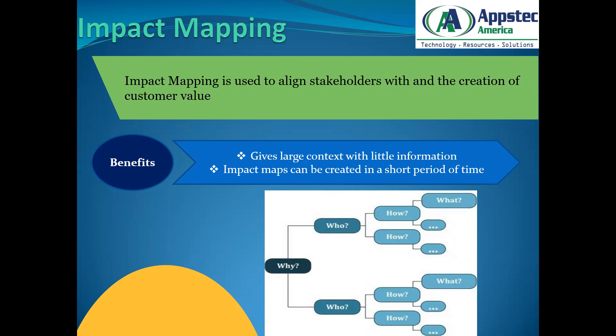Impact mapping is considered a lightweight collaborative planning technique for teams that want to understand the impact of the software or product they are trying to build. It is based on user interaction design, outcome-driven planning, and mind mapping. Impact maps help delivery teams and stakeholders visualize the roadmap, explain how deliverables connect to user needs, and communicate how user outcomes relate to organizational goals — which can include customer satisfaction (CSAT) targets, not just revenue.